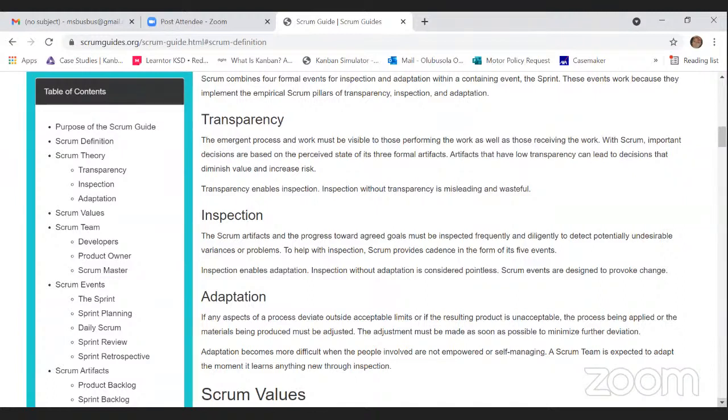If the Scrum Master is working on a task, then he attends as a developer. The daily scrum or daily stand-up is meant for the developers. They come together and they tell each other, this is what we're working on, and it's within 15 minutes. This is the impediments. This is what I'm working on next for today. This is what I achieved yesterday, and then you round up on it. It doesn't mean that during the day you can't reach out to each other and discuss. No, it doesn't mean that you can't, but the daily scrum is compulsory at a particular time, at a particular place, every day of the week.